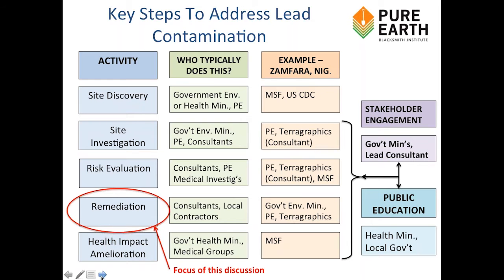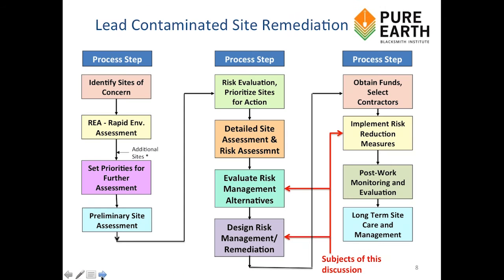In almost all stages of addressing a site, you need to keep in mind that you need to be engaging stakeholders and doing public education. Within the remediation portion of the work, there's a variety of steps: detailed site assessment, evaluation of alternatives, design of the actual remediations, funding, implementation, post-work monitoring and evaluation, and long-term site care.